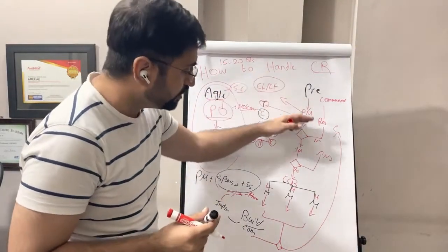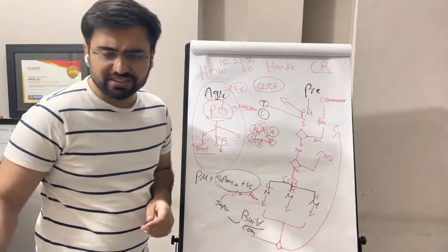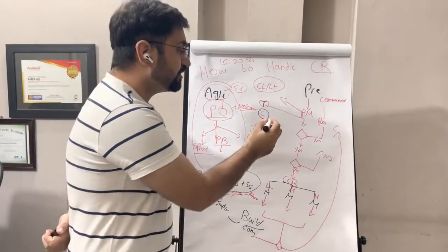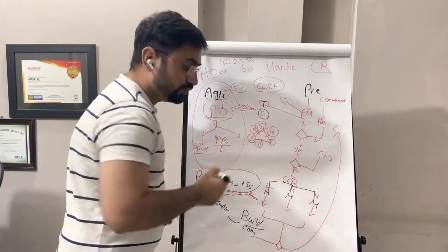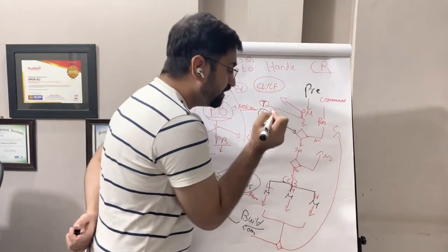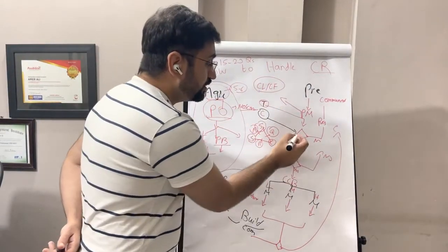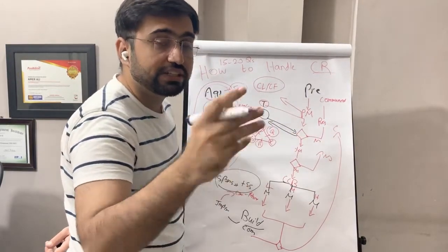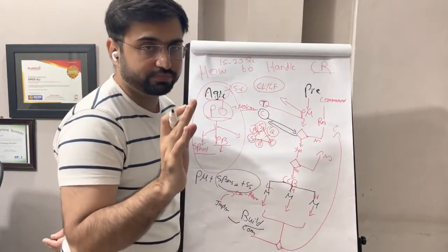So this is the change request procedure when a change comes from a team or a stakeholder. Now there is a little difference when a change comes from the customer. If the change comes from the customer, it will always be in an official format. The PM will evaluate the change on scope, schedule, cost. After evaluation, the PM will tell the customer, hey, because of this change, the cost will increase that much, the scope will increase that much. Do you want to have that change or not?